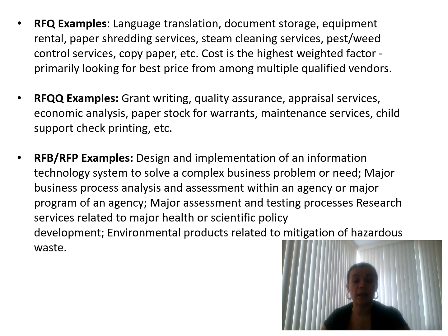So let's see some examples. For a request for quotation, you have language translation, document storage, equipment rental, paper sharing service, steam cleaning service, pet weight control service, copy paper. Cost is the highest weight factor when you're looking for the best price from multiple qualified vendors in the case of this document.